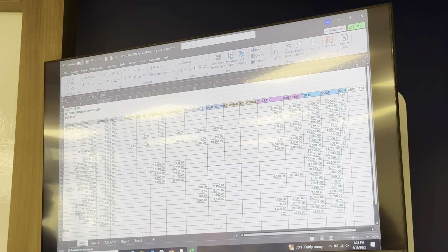Safeties, duration. Temporary fence, I always figure construction fence around the complete job site. And if the superintendent uses less, great, but kind of like safety, I never want him to feel constrained to do the safe thing based off my estimate. So I always wrap the whole job in fence. You survey, you're gonna have one. Drawings and specs, probably makes sense.